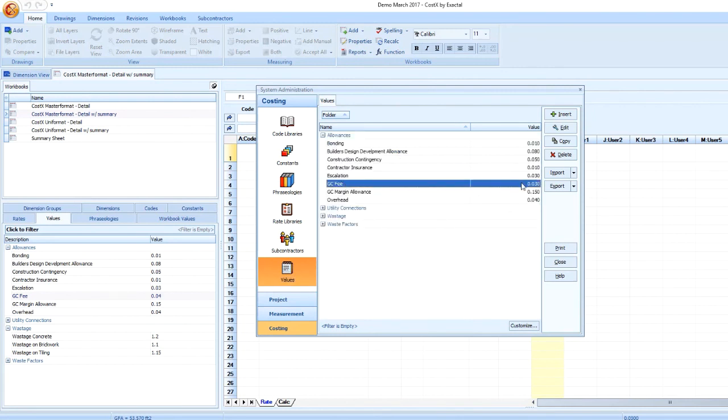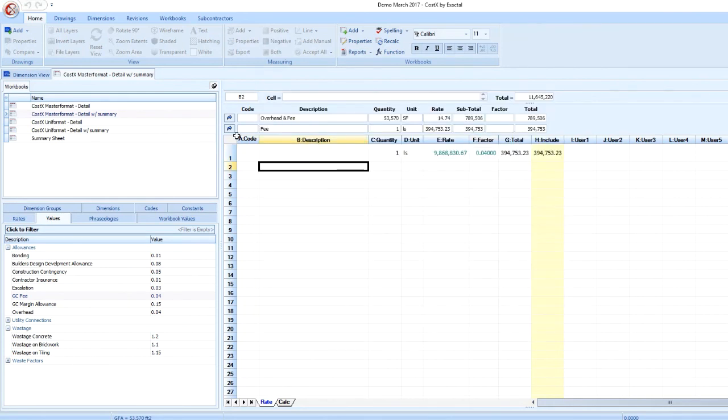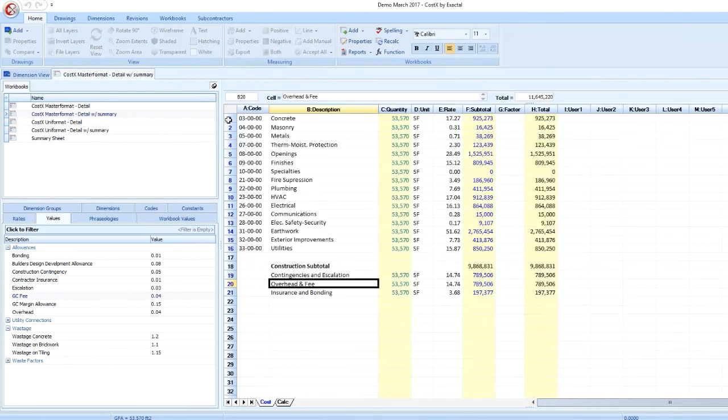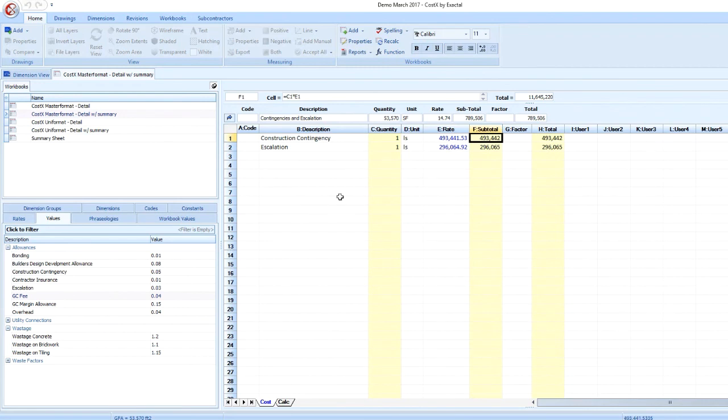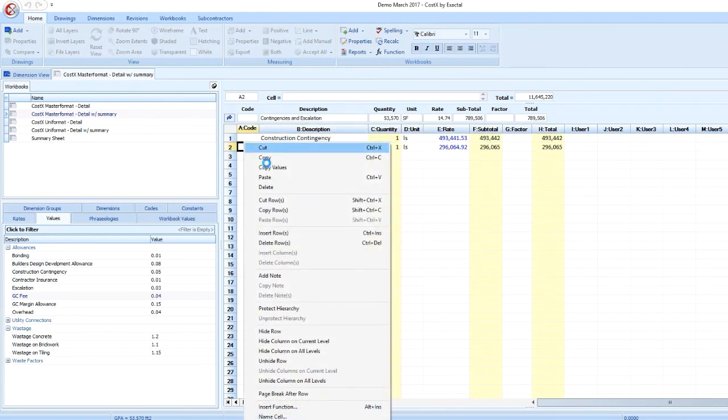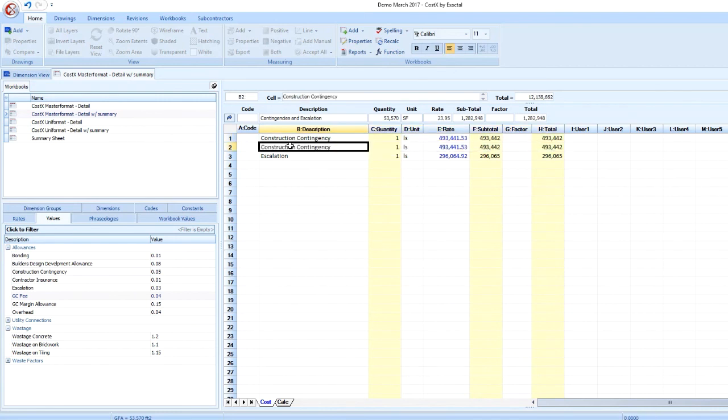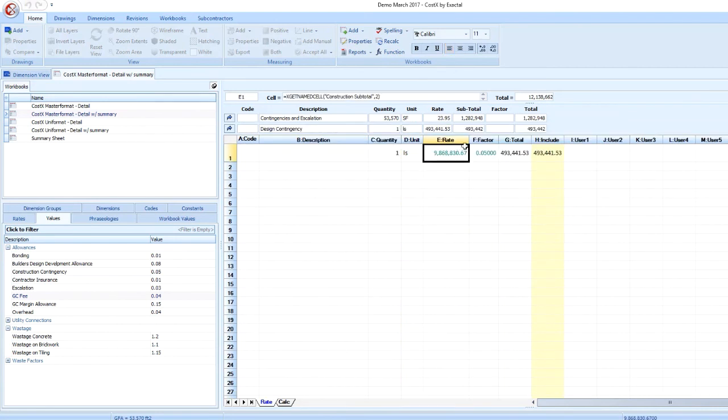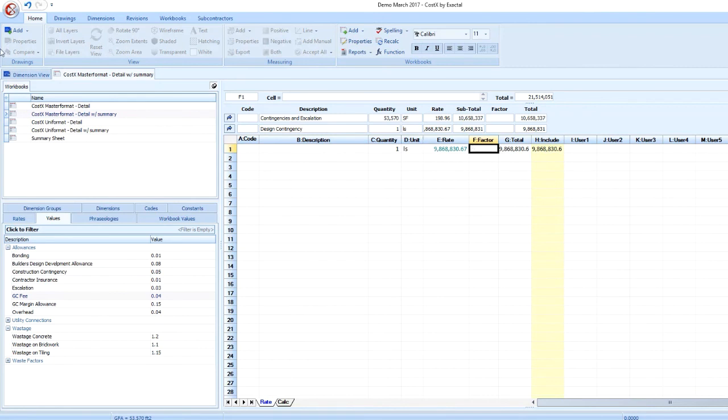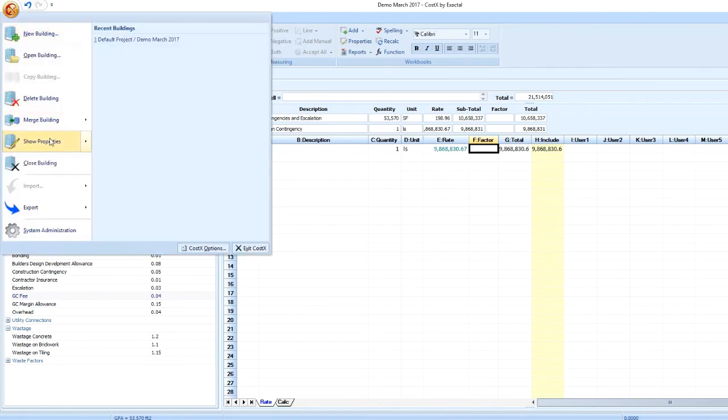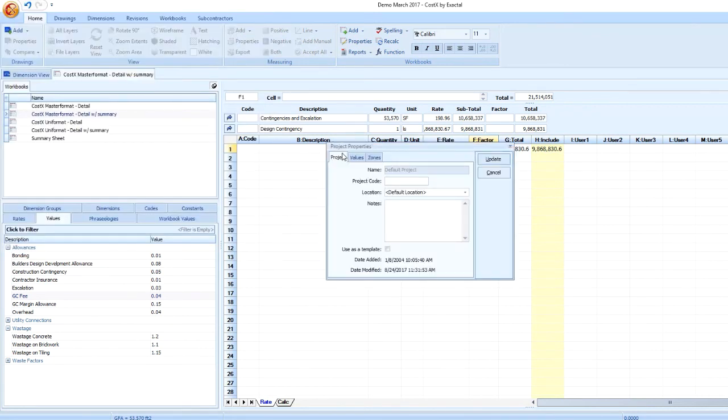I can use these values for waste factors, excavation allowances, and more. I can even create project-specific values in the Project Properties that will only exist within this project. If I have a specific value that is unique to this project, such as Designer Specified Design Contingency, I can create that value in the Project Properties Values tab.